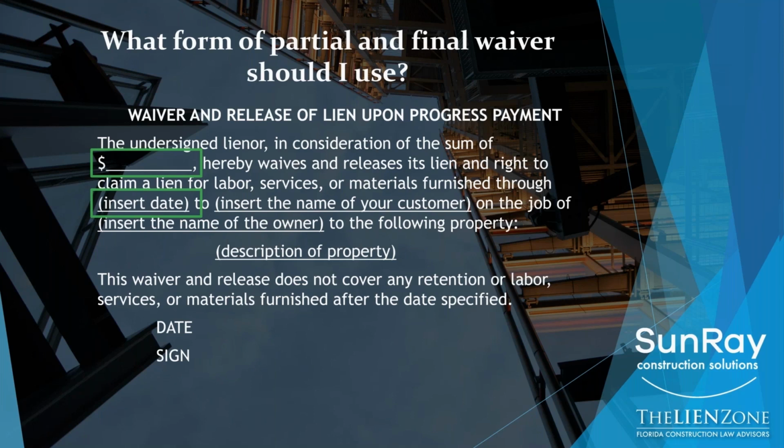Notice the very last sentence that says this waiver and release does not cover any retention. So all the retention that you're holding over the course of the job, that's still reserved, or labor, services, or materials furnished after the date specified. So that's why the through date is so important. And we'll talk about that a little bit later.